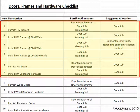I prefer to allocate most items to the door subcontractor, with one exception: hollow metal frames at CMU walls. When the frame needs to be installed before or in conjunction with the CMU work — such as when it wraps the CMU or has anchors embedded in it — it's best for the masonry subcontractor to install those frames. However, if the frame can be installed after the CMU wall is complete, such as a punched-and-dimpled frame with post-installed anchors, the door subcontractor should handle it.